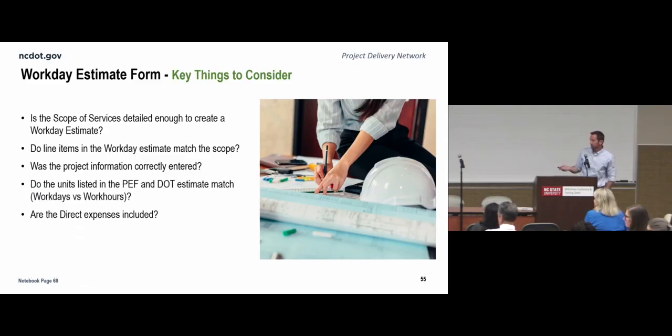And that's what I just talked about, work days versus work hours. I jumped the gun on the slide a little bit, my fault. QA/QC is time that is included on the workday estimate. QA and QC is a designer generally checking themselves or someone slightly higher level checking a designer's work. QC is more of global oversight by the firm, so that time should also be included.